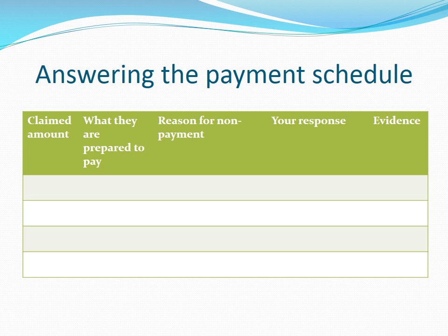First, the amount claimed is either the full amount of the payment claim, or if you have listed several amounts which together make up the total payment claim amount, then the subtotal amount the client has specifically identified for non-payment. Next, it is the amount the client is prepared to pay, which may be nil. You then need to understand why they are not paying and note that down. We will be looking at the reasons for not paying soon. You then need to state briefly, using dot points if necessary, why the client's reason is not valid.